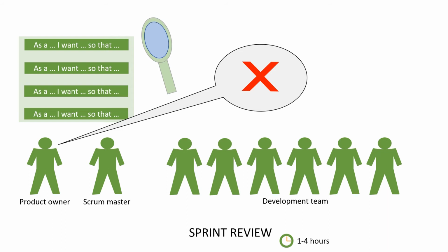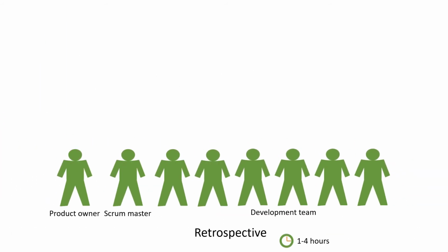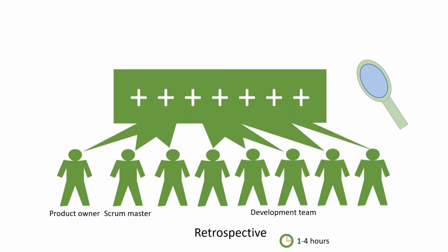The last ceremony is the retrospective, where all members discuss what went well and what could be improved in the ways of working of the team. Ideally, it comes with concrete actions to implement right away for the next sprint. This self-inspection is very important for the health of the team. Then the team can run another cycle, and this goes on indefinitely or as long as the product lives. It is crucial that the pace is bearable, as it is absolutely opposed to the rush mode we often see at the end of conventional projects.